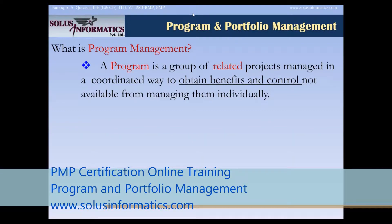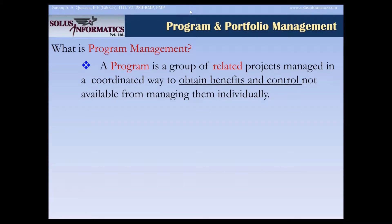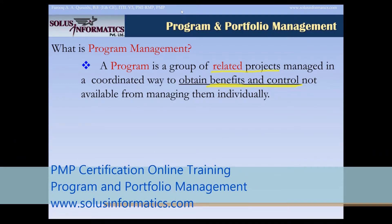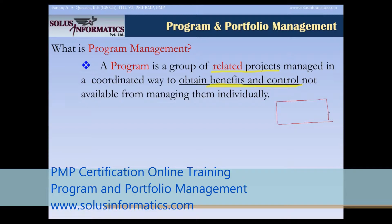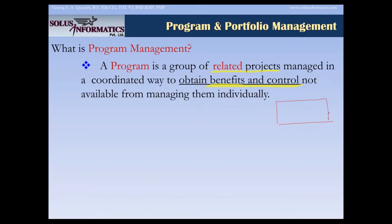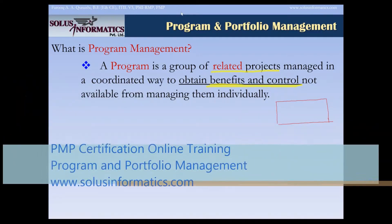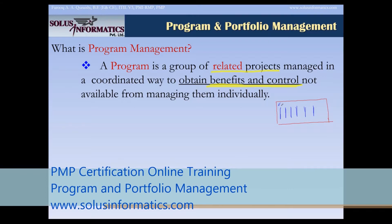A program is a group of related projects — the word 'related' is important. A program is a group of related projects managed in a coordinated way to obtain benefits and control that you would not have got if you had done these projects separately. For example, building an airport would be a program, or the metro rail in Qatar is a program — it would have a group of related projects.